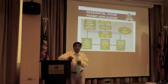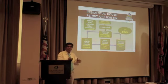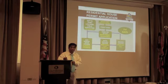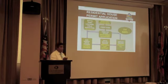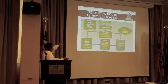In the past, we found out that when we approved a plan, it was not in the plan that there was already an existing house on the property. So when we inspected the septic tank before issuing the occupancy permit, we found out that there were already buildings or houses on the property. And if it's not on the plan, of course, land management is always the authority to determine the authorized zoning. Once land management stamps it, then we are ready to go. It's not our responsibility to determine whether that property is allowed for a single house. So we require inspection, even for just a single house, prior to approving your plan. So that's where the inspection comes in.